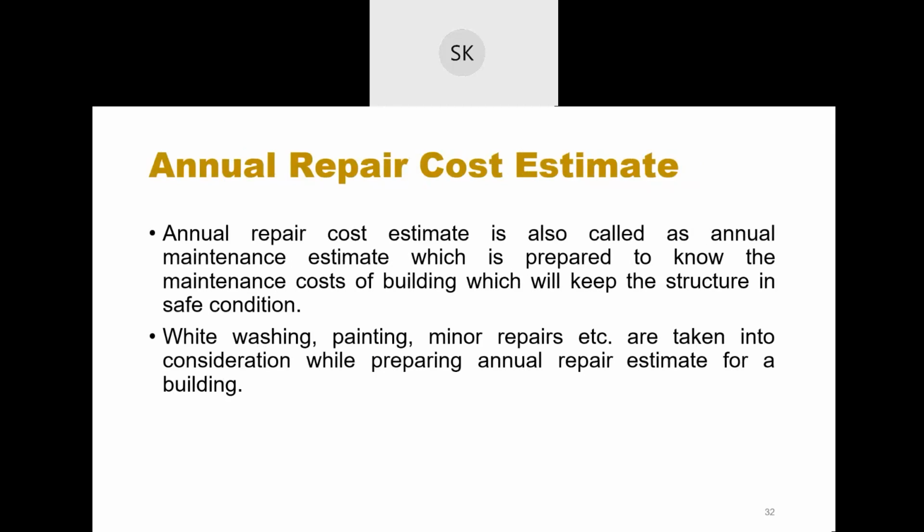Annual repair cost estimate. Once you have constructed the road or the building, you have to maintain it also for 5 years, I guess in government it is 5 years or 6 years. You have to do the maintenance also. So for that, an annual repair cost estimate is to be made.